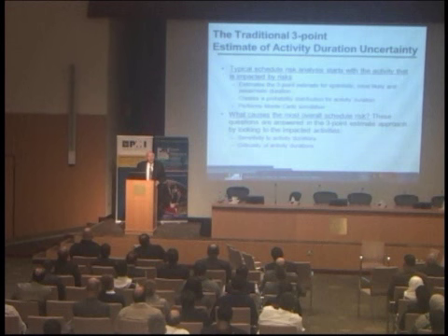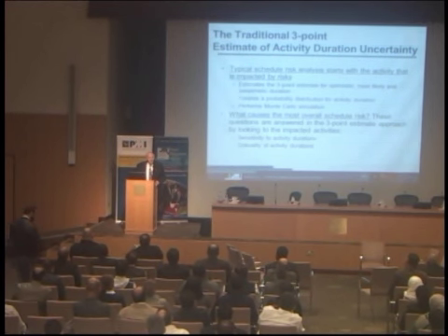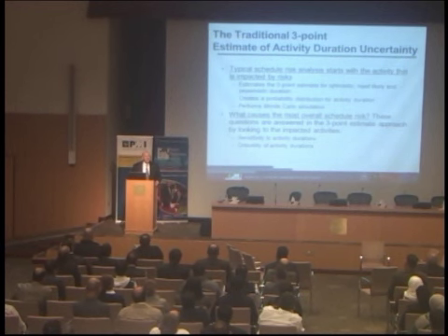So then the contractor should be doing the risk analysis and put the contingency of cost for the extra hours and extra days and months that are worked in the risk analysis of the schedule into their bid.